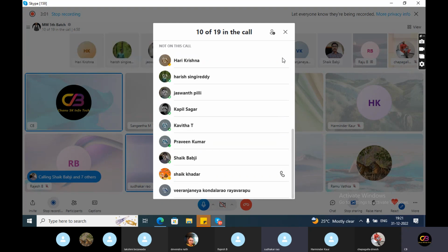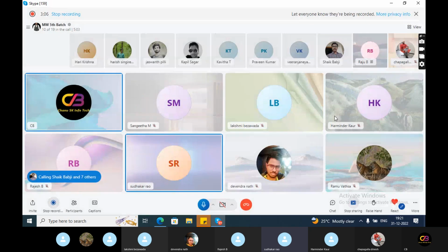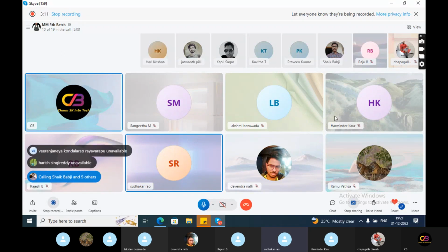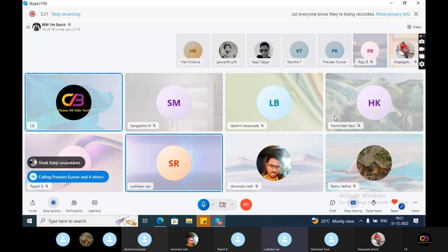Then go for the explore phase. Instead of a blueprint, here there is no blueprint. Here we will go for fit-gap analysis and some workshops to gather the requirements in the explore phase. Then go for the realize phase. Here we will do various types of testing, unit testing, integration testing, and cutover planning also. Then we will go for the deploy phase. Here we will do the cutover activity. Then the run phase. Here the system is ready to record the live transactions.